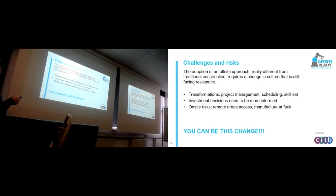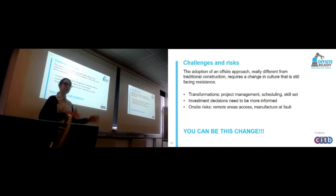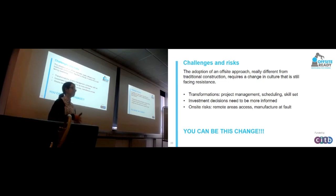Some of the challenges we face are transformational, such as project management, scheduling and getting to grips with the skill set. Very often project schedules are designed for traditional methods, and then afterwards somebody decides to use offsite, but the schedule is not adapted. It just becomes a bit chaotic.